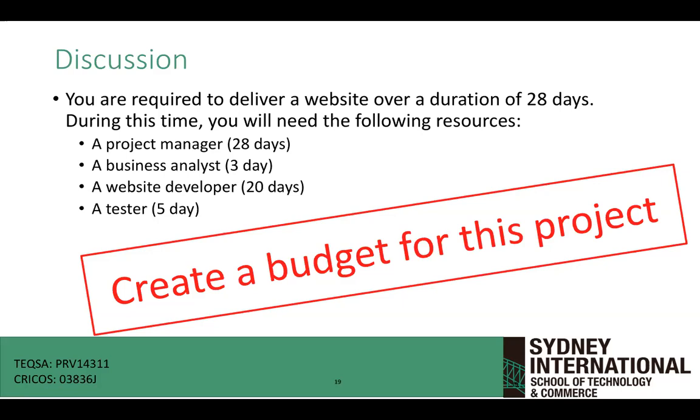Okay. You told me $6,000 for the 28 days of project management. So the project manager is getting $214 every single day. That's less, very less. Is that realistic? No. All right. So let me ask, is there anybody else who got any other cost estimate for project management? Anyone else got an estimate for project management?